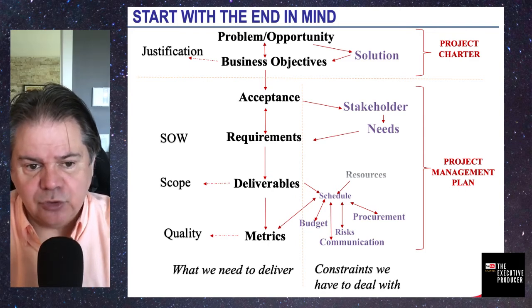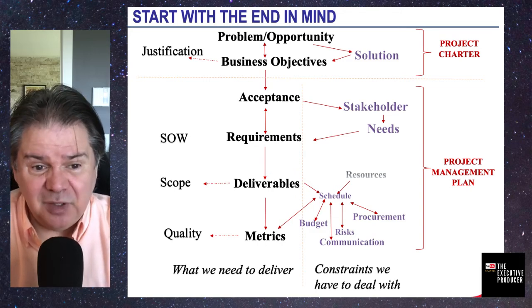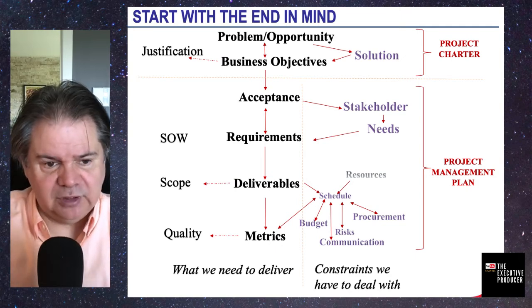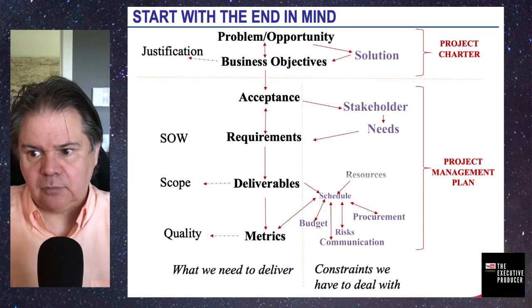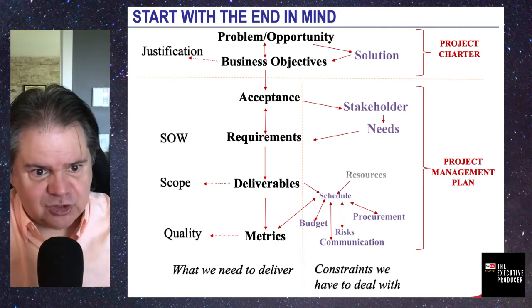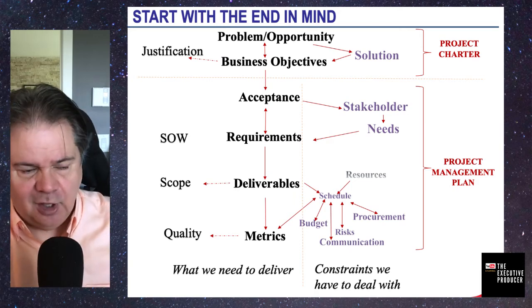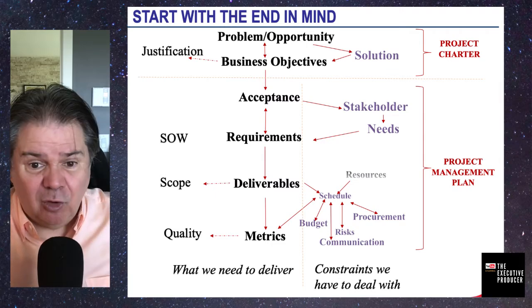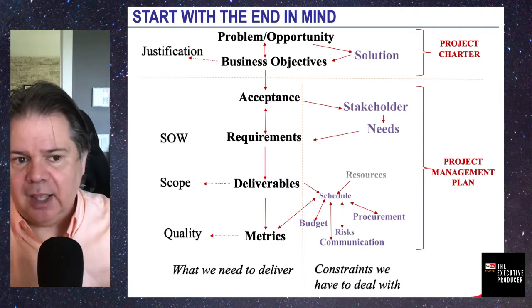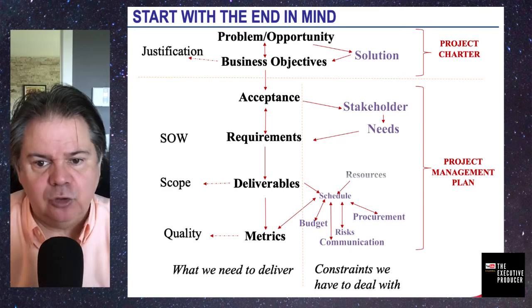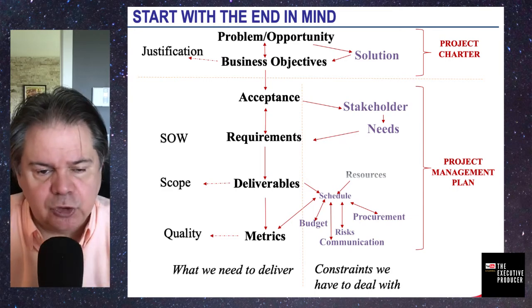activities. Again, resources on quality could be very costly in certain cases and could be very limited in terms of availability over time. If you need to go to a lab for earthquake validation, you might not get in because your schedule is finish to start, and now you're ready to go. They might not be. So they might say, only that date is available for you. So again, quality could derail the schedule. So that's why all activities related to your quality control need to be inserted in your schedule.